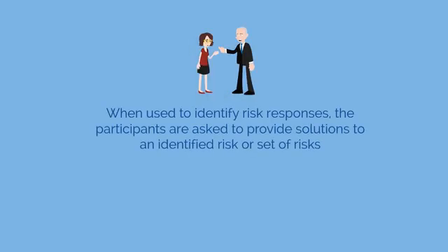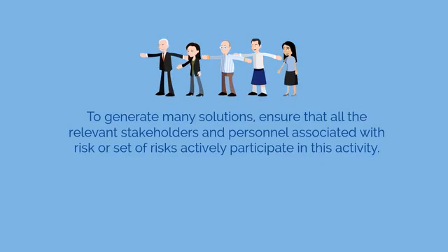When used to identify risk responses, the participants are asked to provide solutions to an identified risk or set of risks. To generate as many solutions as possible, it's important to ensure that all the relevant stakeholders and personnel associated with the risk or set of risks actively participate in this activity.